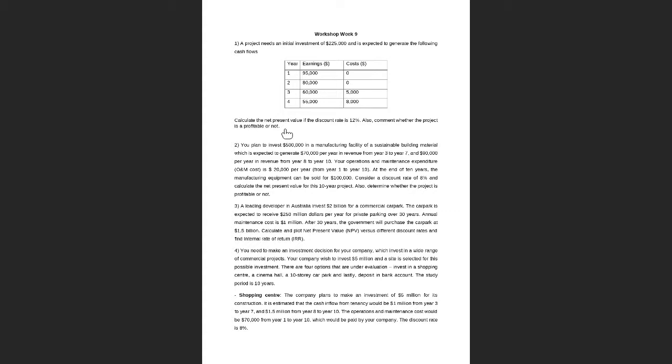All right, great. So whenever you're trying to solve questions like this, always try to put negative and positive signs. So what I mean to say is, whenever there are some investments, in this case you have to pay something out of your pocket, right? So this will be negative, and earnings will be positive, and this cost is also something that you're paying out of your pocket, so this will be negative. So first thing first, you have to convert this entire cash flow to your present value. So you have to discount this cash flow to present value, which is also known as discounted cash flow.